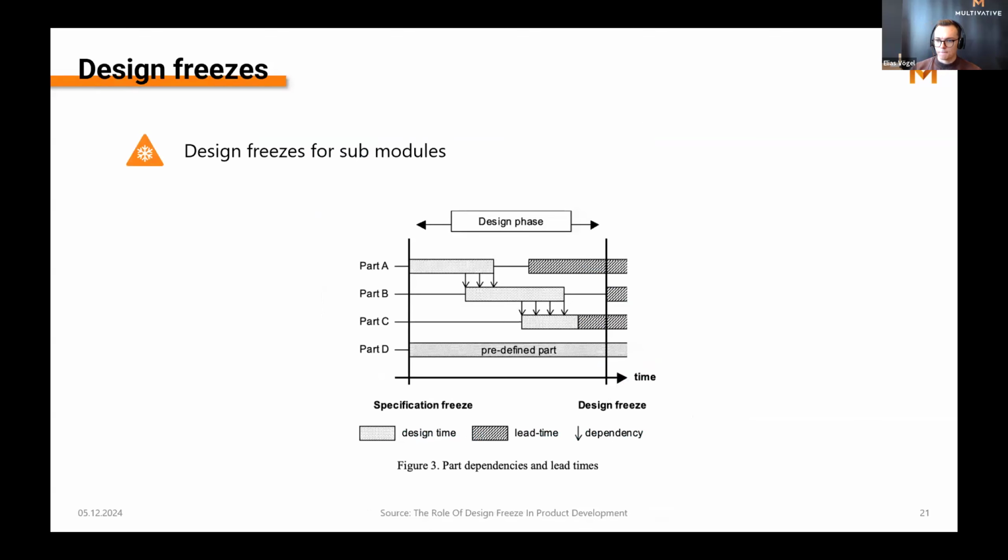And as mentioned before, we can do iterative design freezes. We can freeze the design of critical parts that need longer certification times early on. We can also, for example, do parts where it's not allowed or hard to implement agile methods in a waterfall method because of formalities and legislation, and the other parts in a more agile way. That's the flexibility you get when you design your product in a modular architecture.